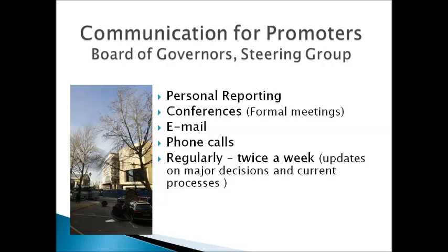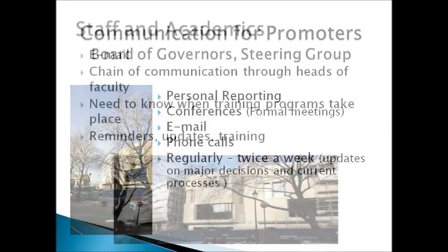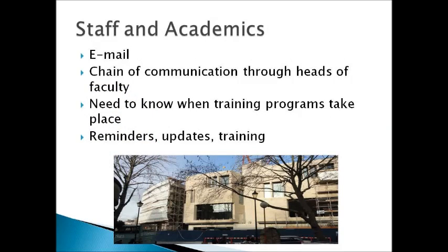The project manager will have meetings or report to the board of governors and the steering group about any developments, such as the completion of the operating manuals and plans, the progress of the relocation, or times of the pre-handover and handover meetings. The architect will have meetings to discuss snagging, notifying them about any defects needed to be rectified by the contractors. The teaching staff, the library staff, and the security staff all need to be informed about the relocation program and their training times.